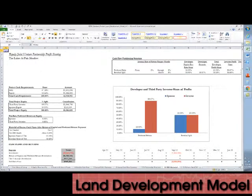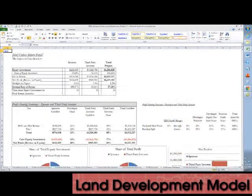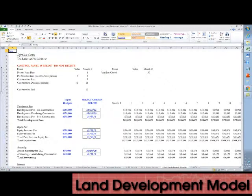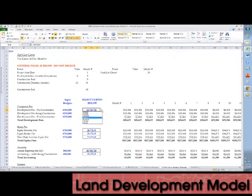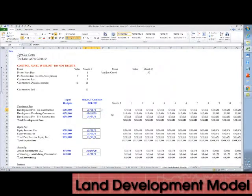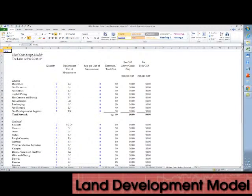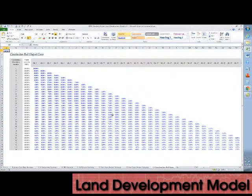There is the waterfall analysis itself, a joint venture return summary tab, and a soft cost budget schedule tab. Each soft cost line item can be allocated according to various S-curves. There is also a hard cost budget schedule tab and a construction bell-shaped curve lookup table for allocation of construction costs.